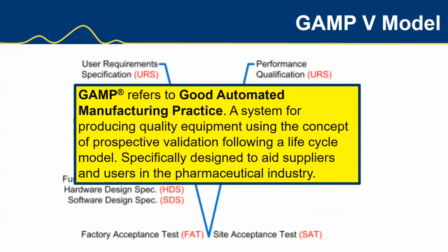And I really feel like starting off strongly with the risk assessment and a really strong URS and following the GAMP V model, everything will fall into place. You know, a risk assessment helps significantly in the development of the URS, and all documentation onwards from the URS should always reference back to the URS and have some traceability.